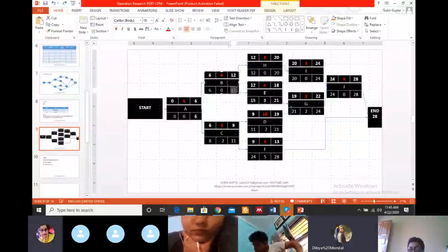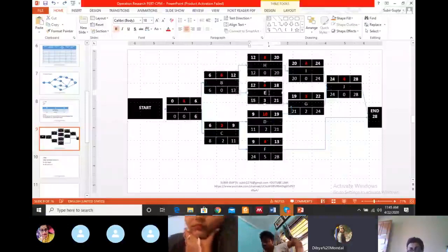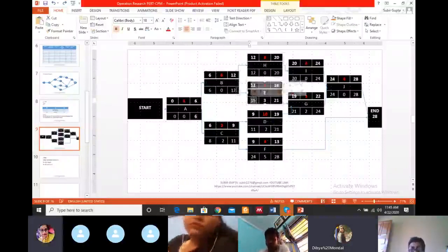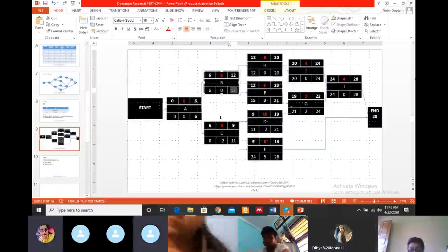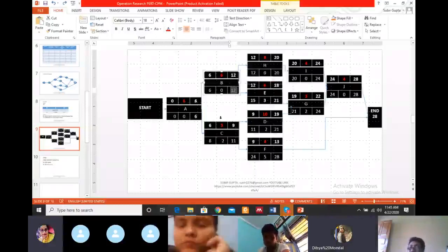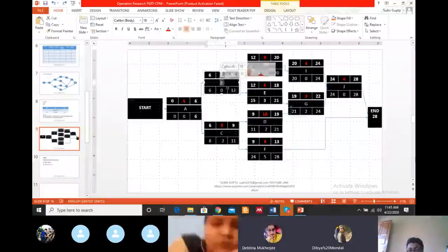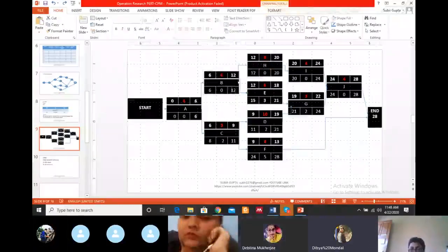আবার বলছি, B আসছে H থেকে আর E থেকে। দুজনকার LS-টাকে দেখো, দুজনকার LS এর মধ্যে যেটা মিনিমাম হবে সেইটা এইখানে লেখো। ফরওয়ার্ড পাথে আমরা ম্যাক্সিমামটা নিই, ব্যাকওয়ার্ড পাথে আমরা মিনিমামটা নিই। Whenever we calculate the forward path, we consider the maximum value. Whenever we calculate the backward path, then we consider the minimum value. For B, the minimum value is 12. So it is 12 minus 6, that is 6.